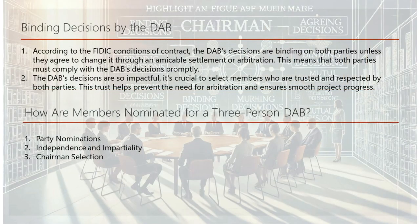Binding decisions by the DAB: According to the FIDIC conditions of contract, the DAB's decisions are binding on both parties unless they agree to change it through an amicable settlement or arbitration. Both parties must comply with the DAB's decisions promptly. Because the DAB's decisions are so impactful, it's crucial to select members who are trusted and respected by both parties, helping prevent the need for arbitration and ensuring smooth project progress.